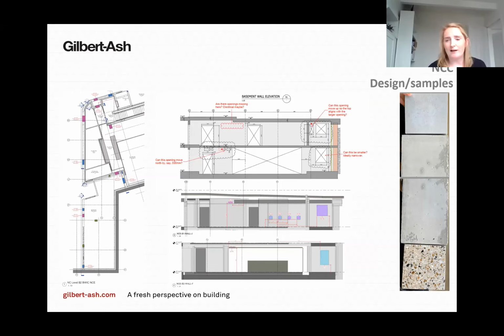So to help with that, we had our subcontractors for the concrete package and the cavity drainage placed very early as well. And a huge amount of coordination started between the structural engineer, civil engineer, our MEP team and architects to resolve all the builders' works openings as we came back up, to also feed into rebar designs to keep us ahead of program, ordering the rebar and keep going that way.